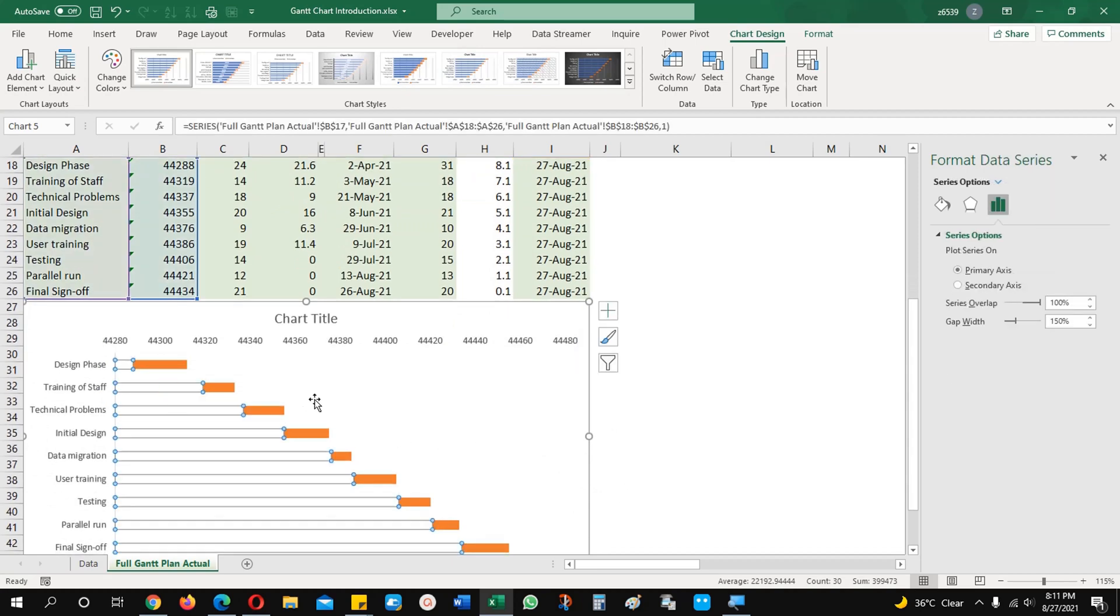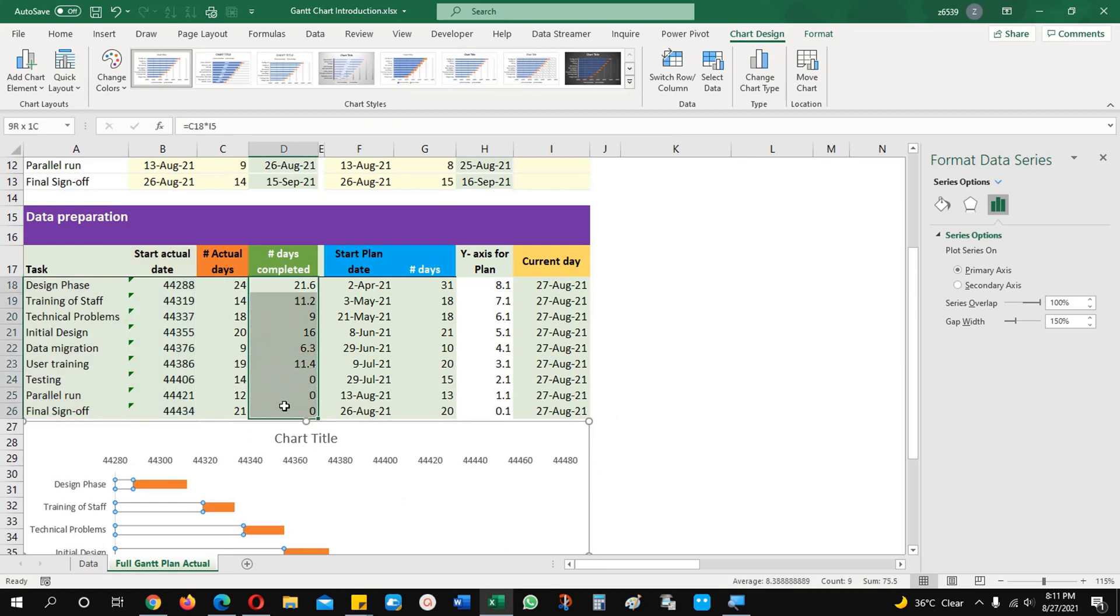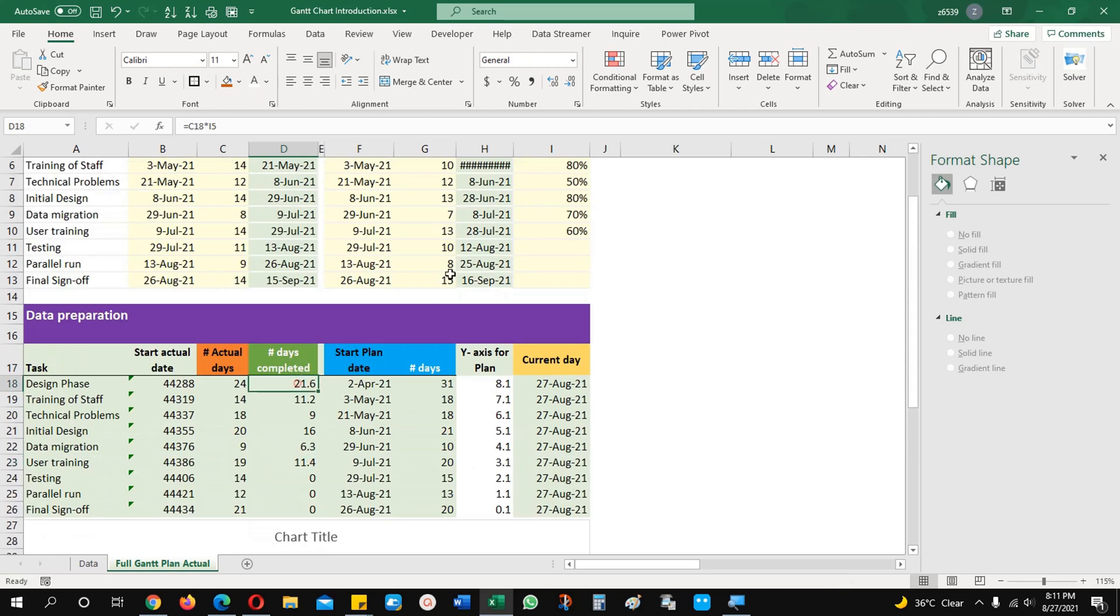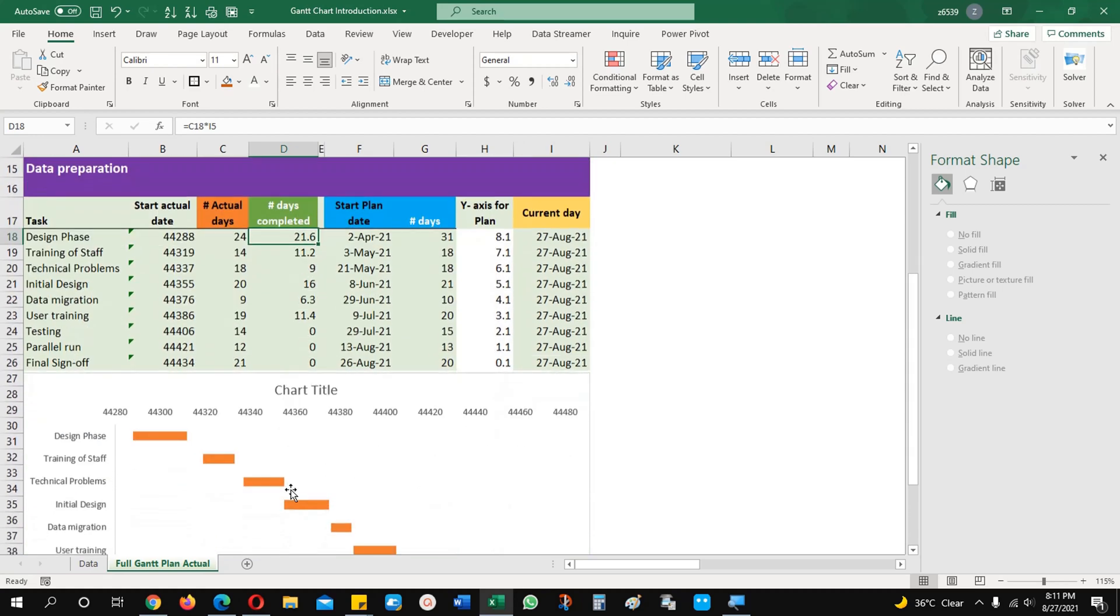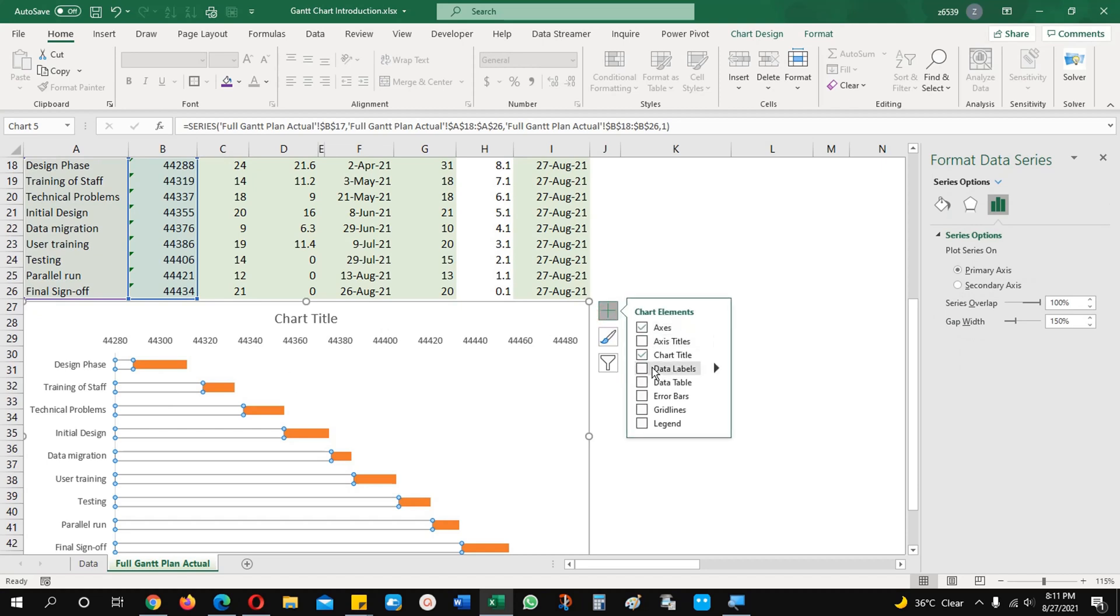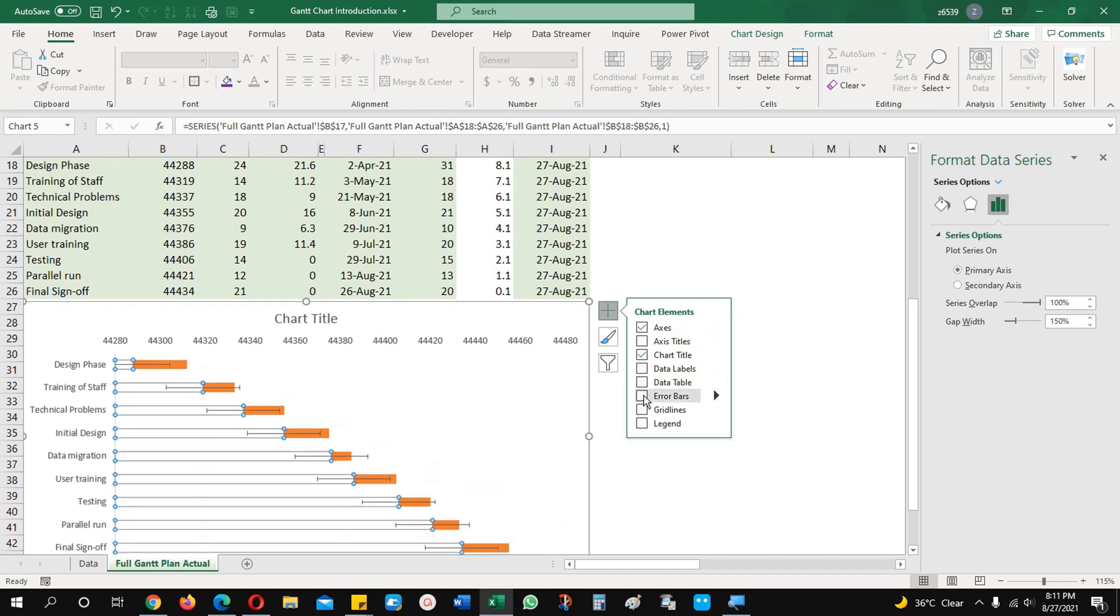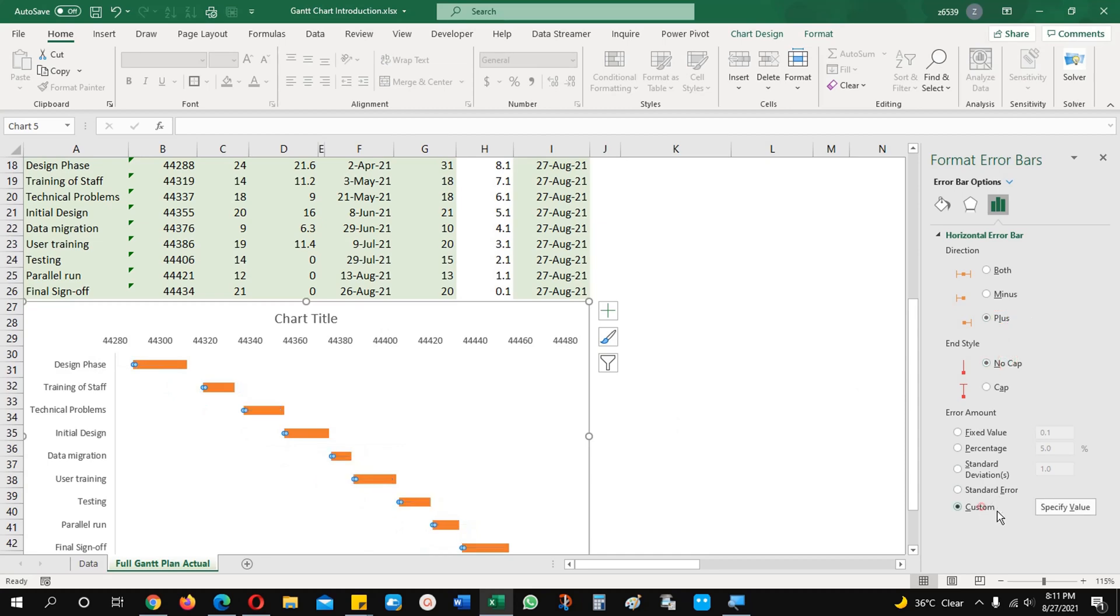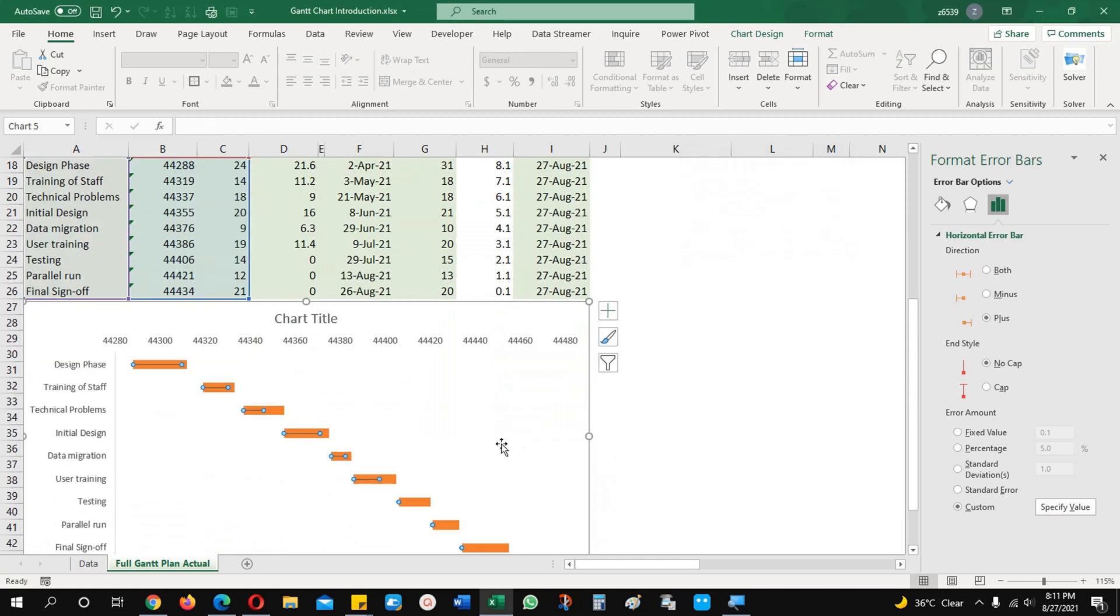I am looking for the actual days completed. And these are my actual days completed. How I calculated? I multiply by this percentage and it is giving me the actual number of days completed. I will just click here the blue error bars and I will come here and I will mention here data error bars. I select these ones and I will go to further more options and this horizontal error bar will be in front of us now. I am going to make it plus, no cap and custom. Specify value, I am going to give it these values to it. And you can see it is available here.